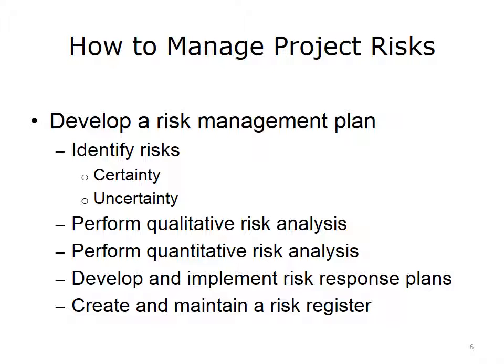At the other end of the spectrum, an example of a high-uncertainty project might be implementing an electronic health record system for the first time. If this is a novel project with a lot of unknowns, your uncertainty level will be higher. After identifying risks, the next step is to perform a qualitative risk analysis. Qualitative risk analysis often includes input from various stakeholders and considers probability and impact data. This type of analysis helps you prioritize risks for further evaluation, which will include quantitative analysis. Quantitative analysis allows you to map a specific value to the risk. Combining these multiple elements in our risk assessment helps us develop a more accurate understanding of our threat level.